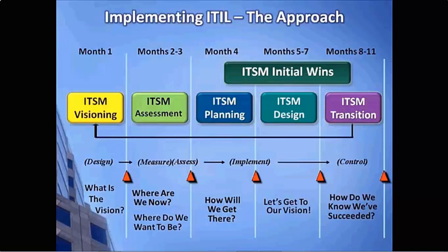One last thought on our approach is that when you run through all these steps of the implementation life cycle here, try to keep this within a 9-month period if at all possible. Don't try to plan this out to extend over multiple years.